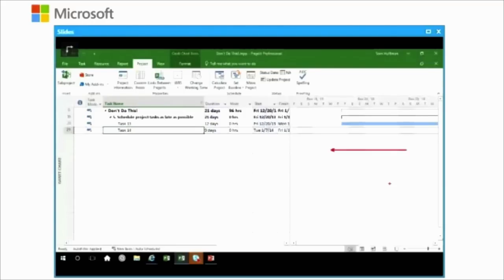It's quite often that we look at durations, we look at projects, we think, boy, I want to know on my finish date exactly the latest that I can start my activities and still make my finish. But if you're scheduling with this method, just bear in mind that there's no slack here for you. There's no bailout mechanism. Everything is as late as possible. All possible flexibility is gone. And if your project date becomes untenable, then it's really the design of the project and the method of scheduling that was chosen, so that you're not even seeing potential candidates for redesign.